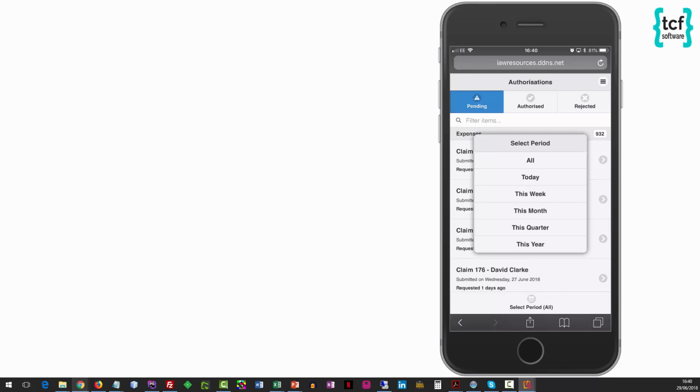So what we do is we do storyboards of how those desktop screens would translate onto mobile. We do that stage 1 that we did in expenses to storyboard it, probably in a PowerPoint. And when you were happy with that flow, we'd then go straight into building it. We wouldn't do a stage 2 demo as we did in the last stage. So that would save a block of cash, because I don't think that's needed going forward, because you're already happy with the way we've built and engineered the screens and how they flow. So there's going to be nothing new, so there's no point doing that middle stage now.